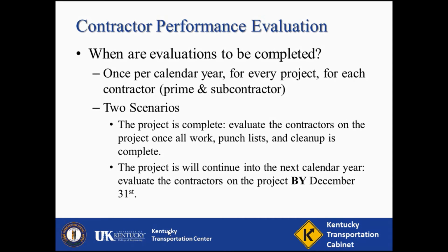First, if the project is completed within one calendar year, the evaluation should be completed once all work, punch lists, and cleanup is complete and seating established. This type of evaluation also applies to multi-year projects within the calendar year they are completed. Do not wait until the calendar year end to complete the evaluation if the previous criteria are complete on the project.